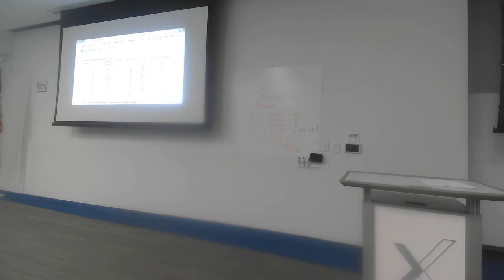I essentially have two options. I can look for an activity that is on both paths at the same time. So let's see if there's any contenders for that. This is the first critical path. This is the second critical path. And so there's only one contender for an activity that's actually on both paths.